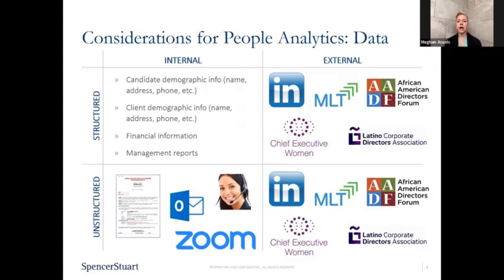And then for external data, we needed to think about what data feeds the organization was already receiving, and what external data sources we wanted to add that would be valuable for our analysis, and then plan timeframes and allocate budget accordingly. So taking into account the procurement process and how much different external data feeds might cost us.